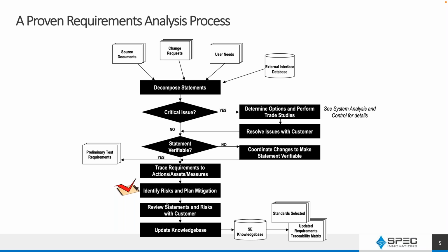So in other words, as I'm coming down that V, I'm thinking about what are the higher level operational requirements. I need to think about how I'm going to validate those requirements on the other side of the V. So if we start doing more of that, we're going to find that the back half of the V goes very fast. So we spend a little more time on the front end, but a lot less time on the back end, and so you end up getting your product out to your customers much quicker.